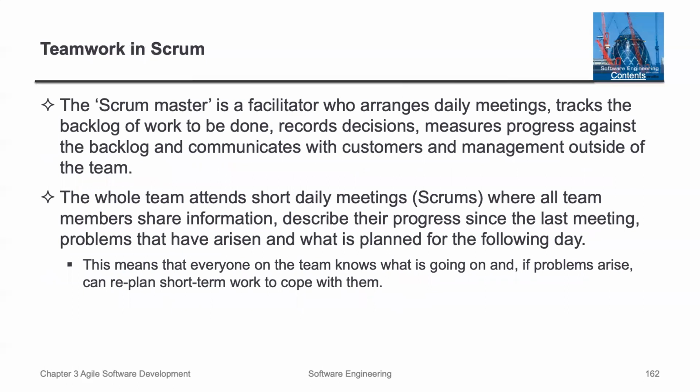So the Scrum Master is a facilitator who arranges daily meetings, tracks the backlog of the work to be done, records decisions, measures progress against the backlog, and communicates with customers and management outside of the team.